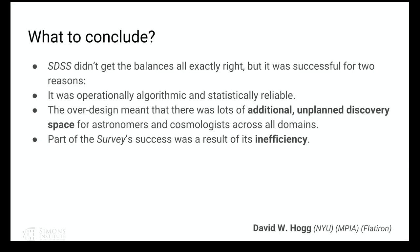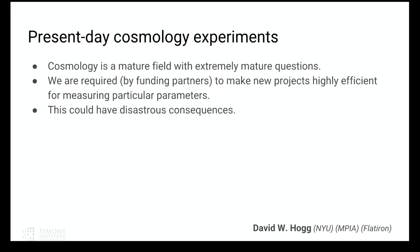Was most of the cost overrun software? No — most of the overrun was failure to start, where various subsystems weren't working and the marching army had to live for another year and another year. That was probably three-quarters of the overrun. Some of the overrun was also just unrealism about 35 CCDs, filters, and telescope control. One of the legacies of Sloan is that now projects in astronomy do have software budgets — they're still too small, but they're not zero.